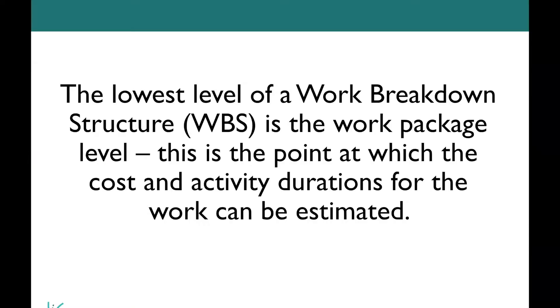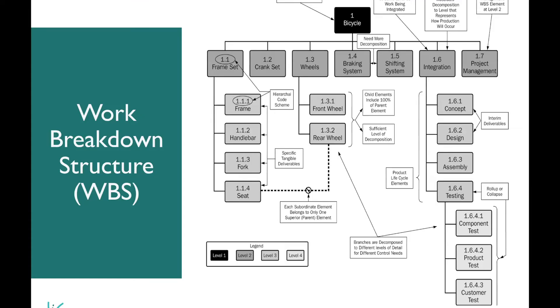When you're in the planning phase and have broken your work breakdown structure as low as it can possibly go, it's called the work package level. That would be the lowest level of your work breakdown structure. This is the point at which you can begin to estimate cost and activity durations. I cover work breakdown structure and creating one on a different video.